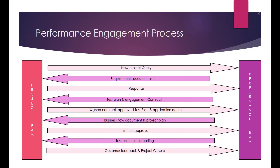As you can see on the screen, it shows the graphical representation of the performance engagement process. The project team's tasks include: responding to the requirement questionnaire, signing the contract, approving the test plan, providing an application demo, providing written approval on the business flow document, and providing feedback on the closure report. The performance testing team's tasks include: sending the requirement questionnaire, preparing the test plan, creating the business flow document, creating the project plan, executing tests, and reporting results.